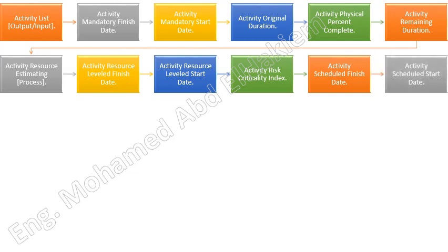Activity scheduled start date. The point in time when work was scheduled to begin on a schedule activity. The activity schedule start date is normally within the range of dates delimited by the activity early start date and the activity late start date. It may reflect resource leveling of scarce resources. Sometimes called activity plan start date. See also activity current start date, scheduled start date.